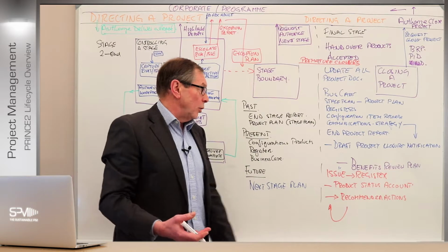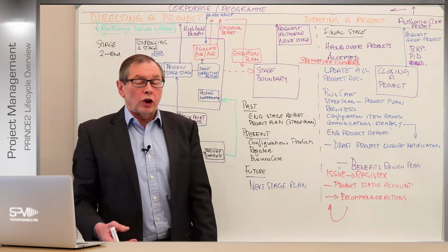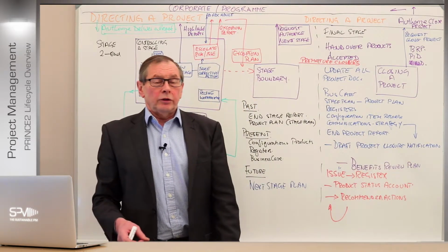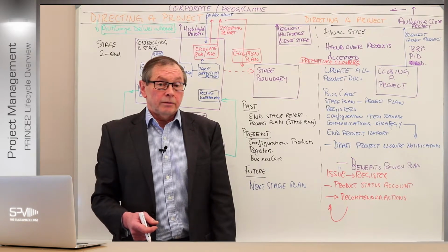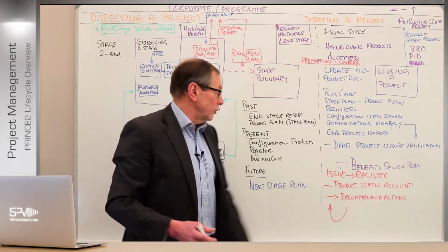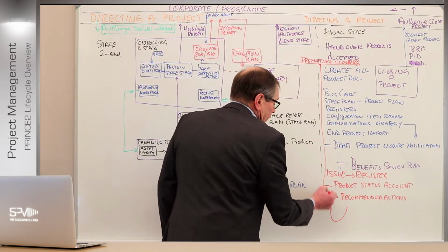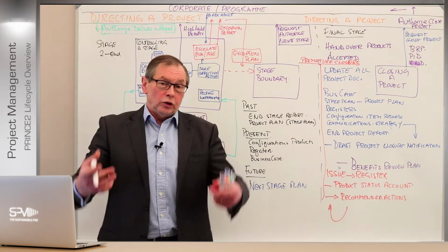Do an end project report. We need to do that. But remember, do make sure you document it from an issue. And then we go through the rest of it to request authorisation from the board to close the project. So that premature close will link from anywhere. It links down to all this stuff here, but you still have to go back and complete the rest of the documentation anyway, close it all off.